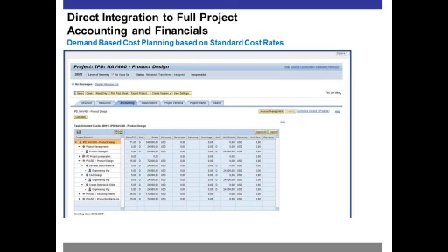And then now at that operative project level, the system is going down, and I touched base on this earlier, saying, hey, I've got a phase 1 developed specifications here. I've got an engineering manager there. He's got 5 man-days of effort, and the system will automatically build out this cost, 24,000, via the costing information that's built in at the resource in the operative project. So the system will build your planned cost values for you within the PPM tool.